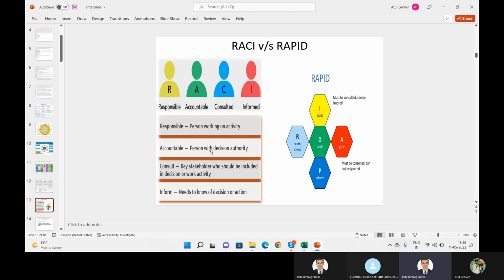I think they left the meeting. She had to drop for some things. So the thing is that who is accountable here, Hitesh? Your wife says that you are accountable. You said no, you are accountable. But the fundamental says for any activity, only one person is accountable, never two. So at last we say the person whose flavor has been agreed, that person is accountable here.